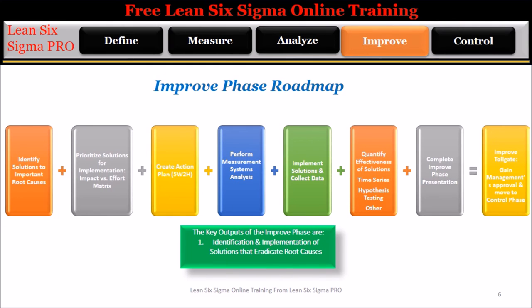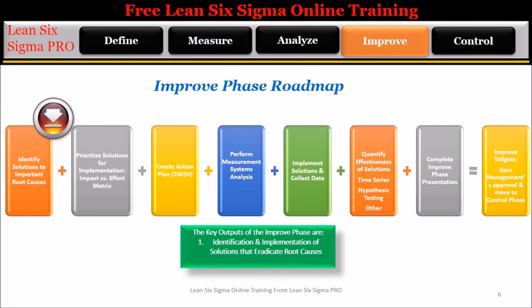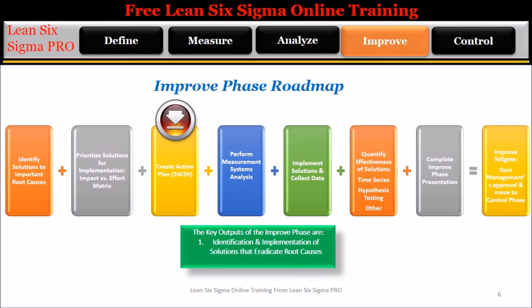The Improve Roadmap is a summary of all of the steps required to complete the improve phase. Step 1: Identify solutions to important root causes. Step 2: Prioritize solutions for implementation using an impact versus effort matrix. Step 3: Create an action plan using 5W2H for improve implementation.